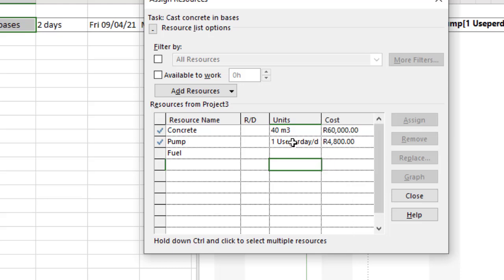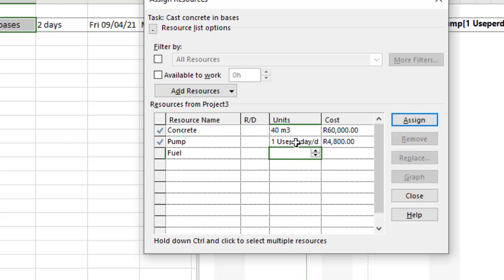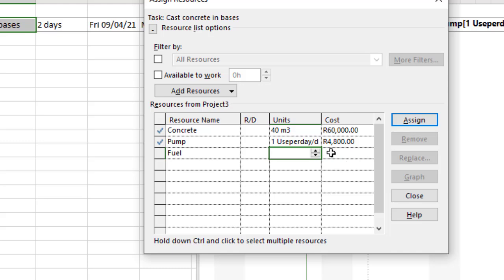As the days increase, obviously you're going to need the pumps for those additional days. At this stage we've got 2400 rand per pump, and because we're going to use it for two days it already works out that cost to 4800 rand for us.